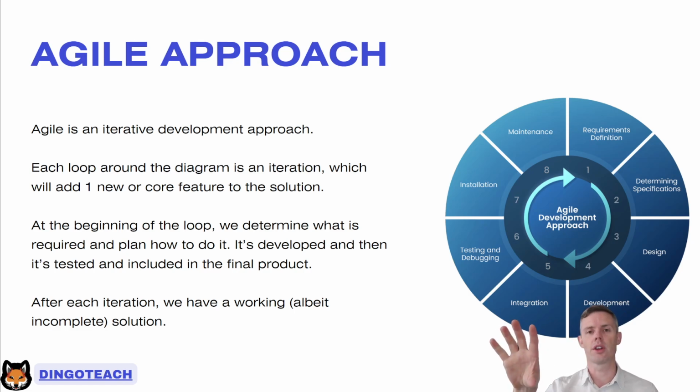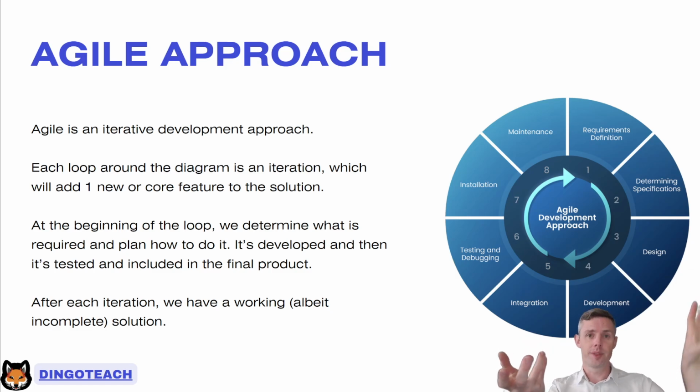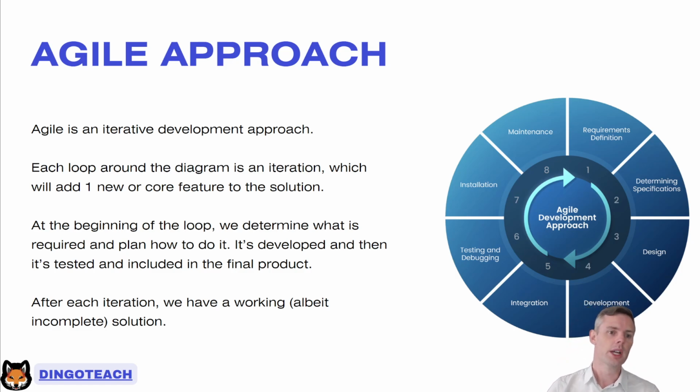The first team can be working on the core features, while the second team can be working on those stories and those brand new features, while the first team is still going, so that when these guys finish, these guys are almost ready to release. And that means the first team can move on to the next feature. And you might even have a team 3 that's working on something else in the background. And so again, this loop just continues and continues until we have a functioning, maybe incomplete, working solution. So it's faster, it's more flexible, more features can be added over time. Okay, those kind of things sort of kick into gear.